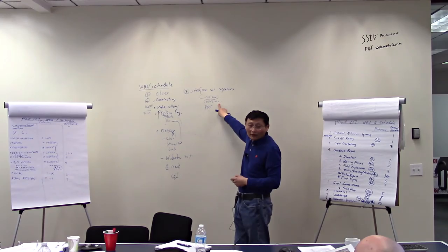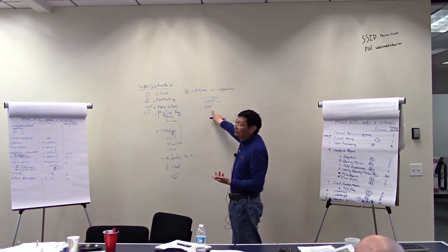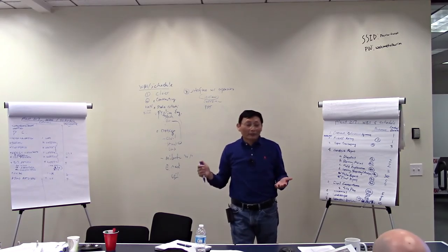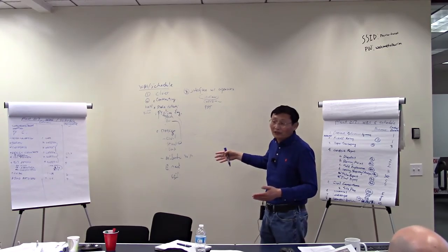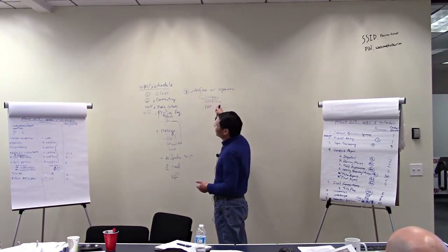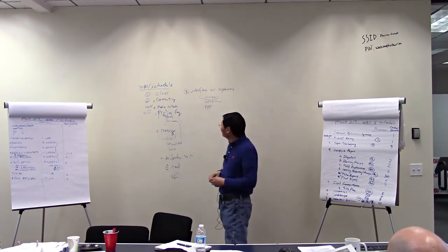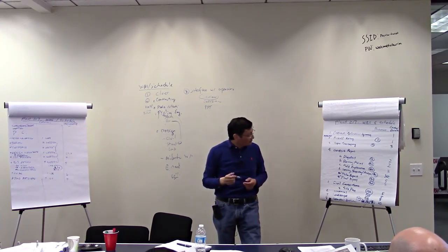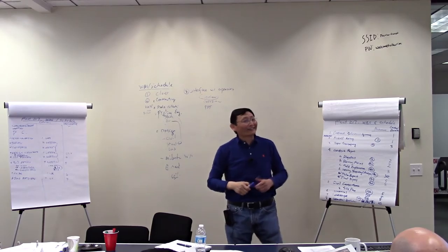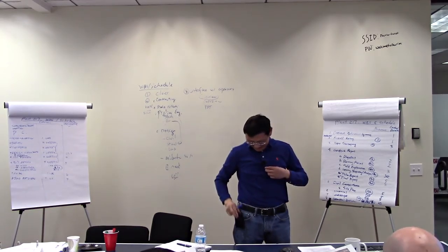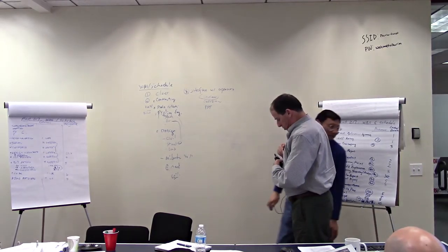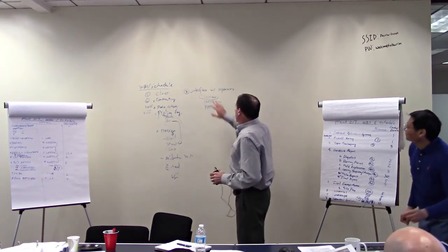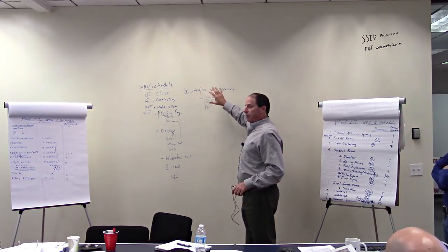Similarly with coordination, when coordination happens periodically over time, you may have just one line item in the scope of work, but that duration sense is not reflected there, and it has to be reflected somehow in the schedule. Same thing with the PDT. We say, okay, we're going to do 10 meetings in the scope of work, and that's all we said. But from a duration standpoint, it is not clear in the scope of work, and needs to be made clear in the schedule. What else? That's what I can think of.